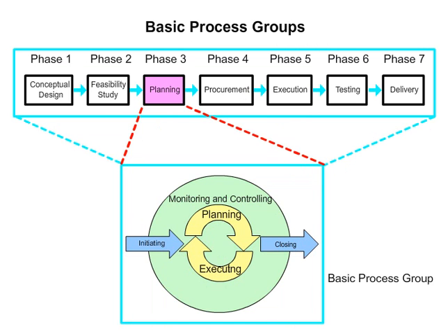4. Monitoring and controlling processes. Be aware of diversions from the plan. Perform corrections to align the project to the plan. Accept and evaluate changes requested by stakeholders or team members. Modify the project's schedule if needed. Adjust the amount of resources if needed. Make changes such as trimming the project scope. Modify the project's goals and return to the planning process to obtain the approval of the stakeholders.